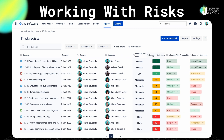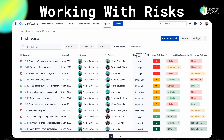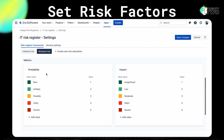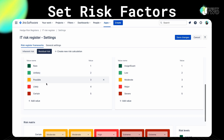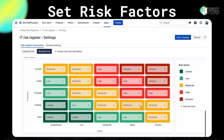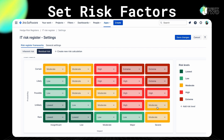You can choose between different metrics and calculation methods for your custom formula. For example, you can use a drop-down option for probability and impact metrics. Almost everything in our app Hedge is customizable, even the risk score. You can use the standard probability multiplied by impact. Once you access the risk, figure out what actions need to be taken in order to avoid or reduce the probability of that risk happening. If a particular situation arises where there is some probability of occurrence, you'll be able to link JIRA issues to the risk and track progress.